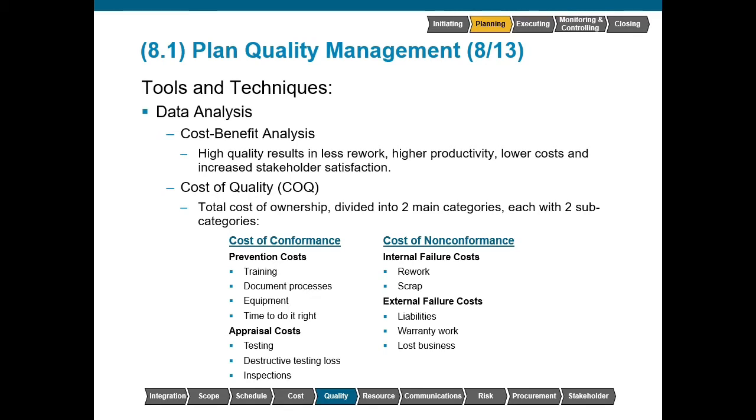Nobody will send you a rebate check at the end of the year, and nobody's going to thank you for maintaining your own vehicle. For that reason, stakeholders that are unaware of the benefits of an oil change may choose to skip doing so. However, with the cost of quality, the heuristic is that you're going to be paying at least 6 times as much for nonconformance as you would have paid for conformance.